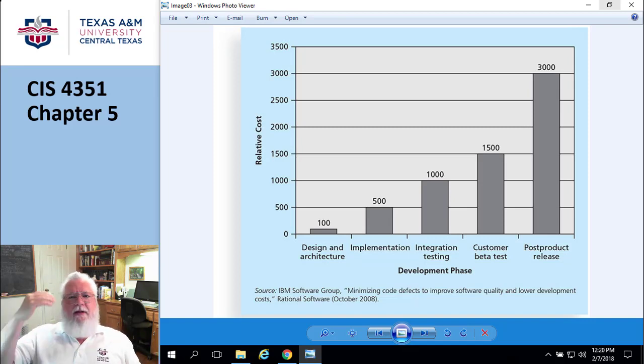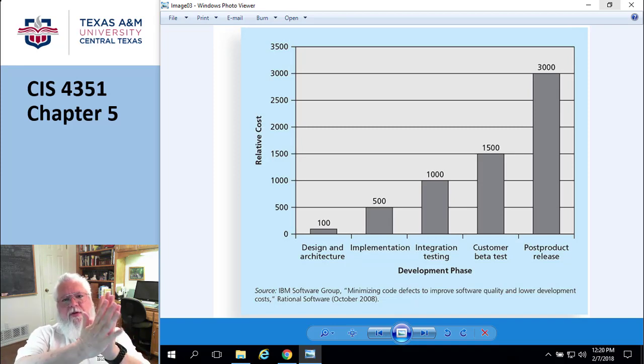And so we went through like 4 or 5 revisions of this. And the moral of the story is these people could not articulate the requirements. The gap was just too big. They could not do it. The only way I could pull requirements out of them is to show them a prototype and say, is this what you want?